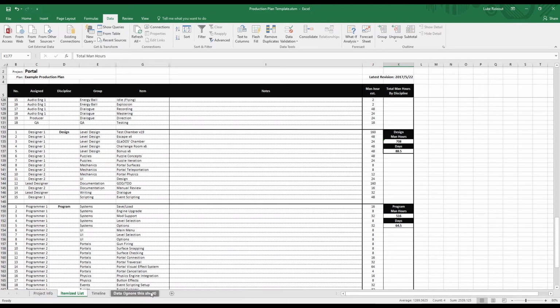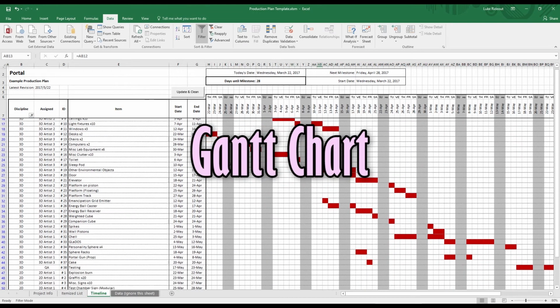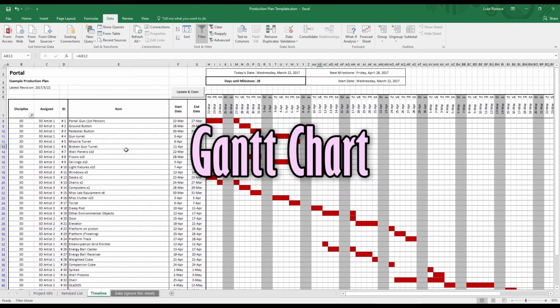These tasks can certainly cascade, with an artist finishing one item then moving on to the next while the animator takes on their tasks, but ultimately a project can't have all members working on everything at once, as there are going to be elements that rely on other tasks to finish first. Our producer and designer would, in this case, collaborate to create a timeline, setting start dates for each task, and the man-day costs associated would then set an implied end date thereof, which would in turn become the start date for the dependent task. This process would continue until every feature and every task is accounted for, and we have what's known as a Gantt chart, displaying an ideal development timeline.